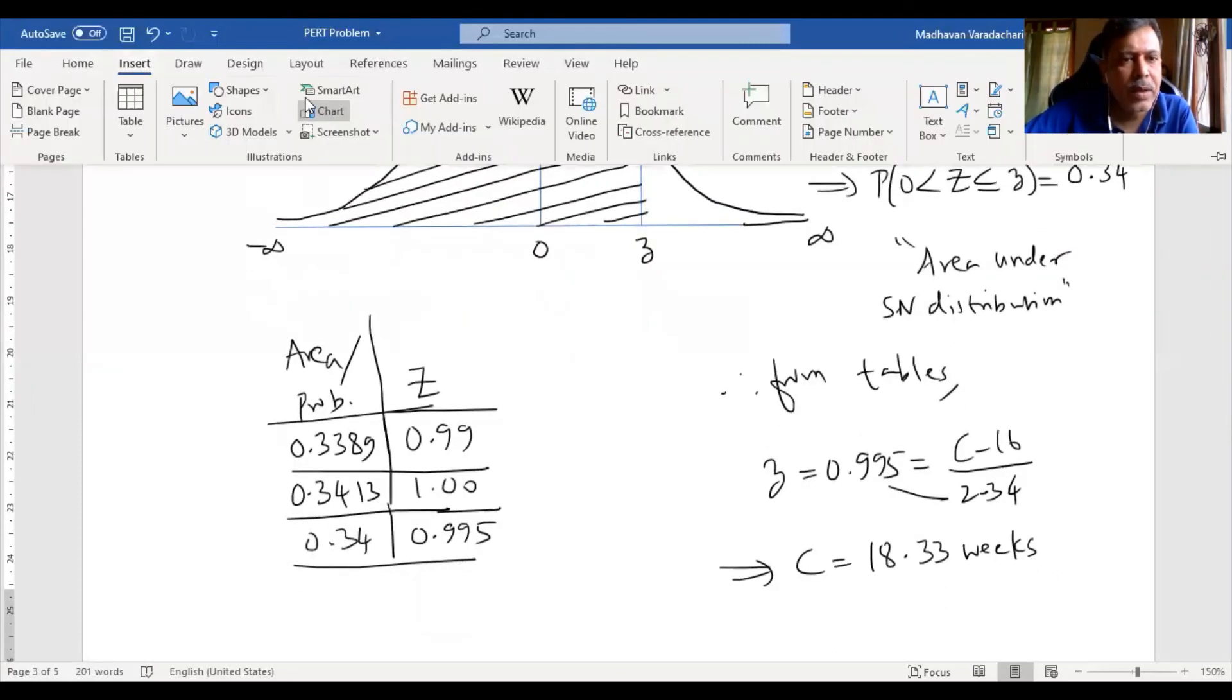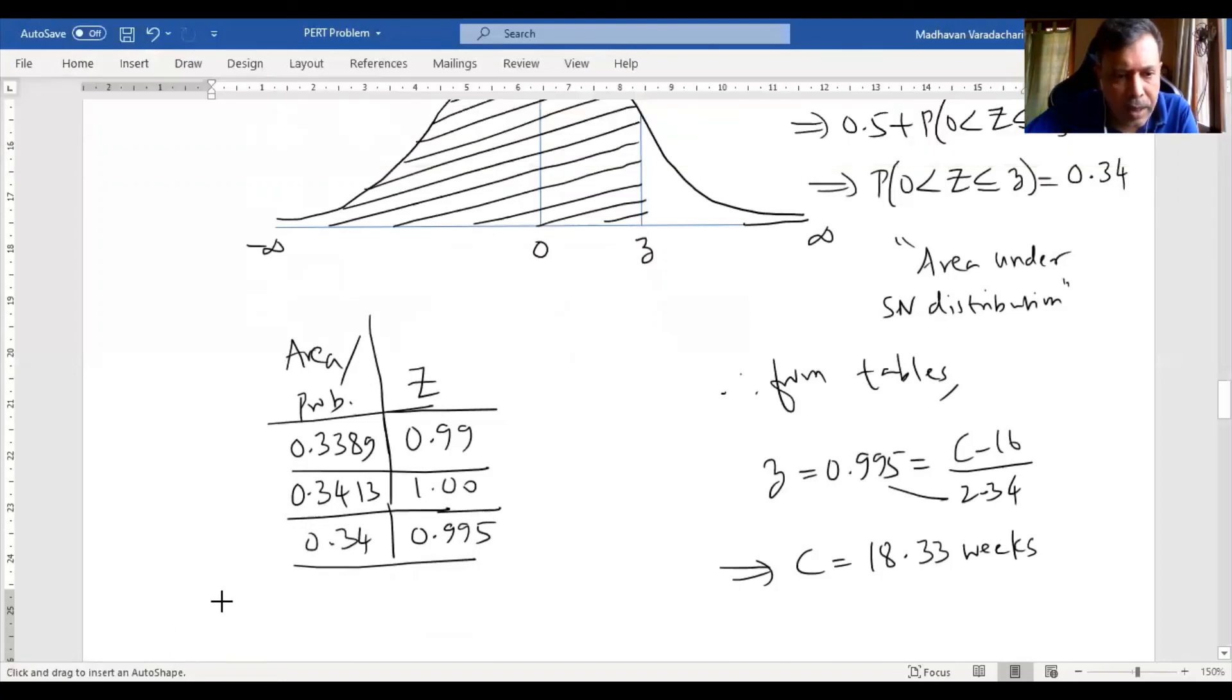So that ends this particular question overall because we have done all the questions A, B, C, D and E. This is about the project evaluation and review technique where we don't have the duration as a deterministic value, whereas it is considered probabilistic. The activity durations follow a distribution called beta distribution. We used the mean and variance of that beta distribution to find individual activity durations, then applied those mean durations to find the critical path and subsequently solved these probability problems.